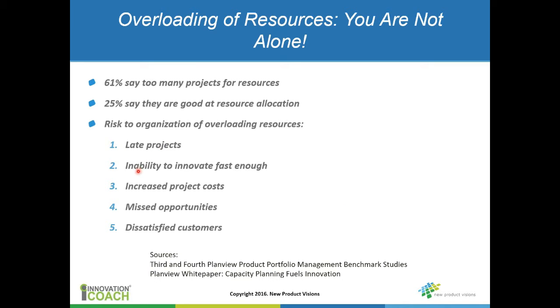So the other risk is because projects are late, it means you can't innovate fast enough. Time to market gets longer. That's a real problem. The project costs go up because the projects go longer. You might miss opportunities as a result, and of course, ultimately, you may have dissatisfied customers. So there's a lot of risk when you overload the resources.